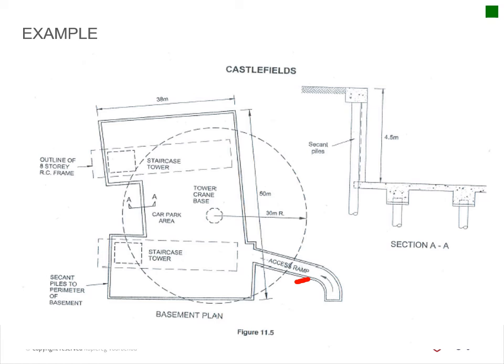So I'm also not going to go through the method statement in detail, but you will see you've got your description of the works at the top. That's the one that you've just started, and then you've got your sequence, where prior to excavation works taking place, the following procedures must be carried out, and then you list your details of how to go about it. Then you've got a second section, your resources, your supervision, your labor, your plant. You list all those items that you need to sequence here.